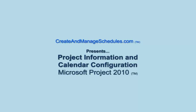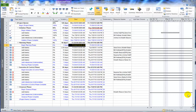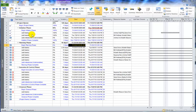Hello, this is Dora Tarver from CreateAndManageSchedules.com, and in today's lesson we're going to review how to define the project information, including how to set up the project calendars. A project doesn't typically start the day that you create your project file. So after you've created your project file and defined your project start date, you need to set that start date in the project file, and project will automatically assign that date to your tasks.